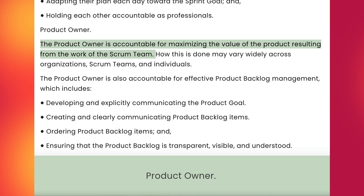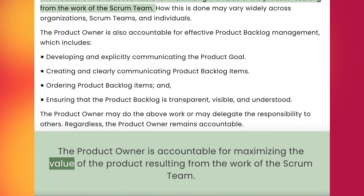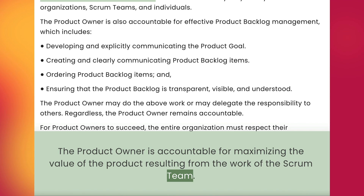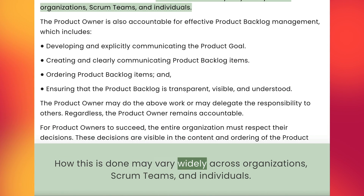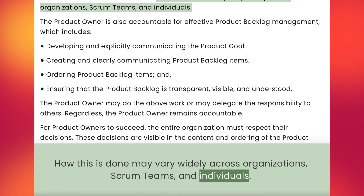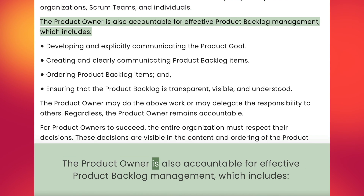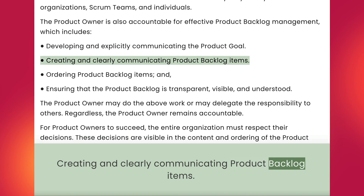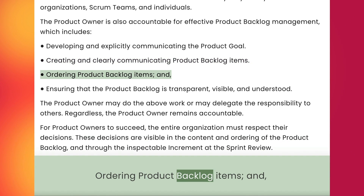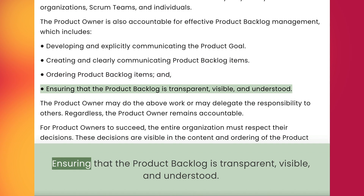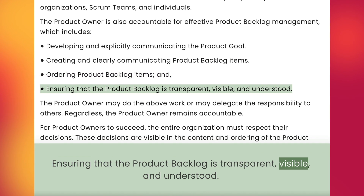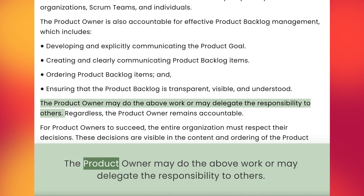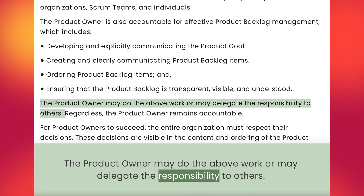Product Owner. The product owner is accountable for maximizing the value of the product resulting from the work of the Scrum team. How this is done may vary widely across organizations, Scrum teams, and individuals. The product owner is also accountable for effective product backlog management, which includes: developing and explicitly communicating the product goal; creating and clearly communicating product backlog items; ordering product backlog items; and ensuring that the product backlog is transparent, visible, and understood. The product owner may do the above work or may delegate the responsibility to others.